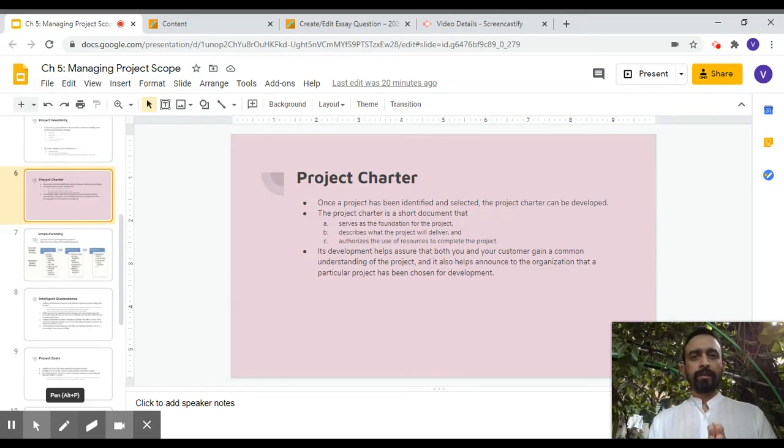Say, for example, right now our donors find it difficult to donate to us because it takes like 6 or 7 steps to donate. These are the 7 steps, and we are going to remove steps 5 and 6, and we are going to combine steps 3 and 4, and then we're going to shorten up steps 1 and 7, and so therefore this is going to be the smaller process. Okay, so once you get to that level, that can go into the project charter.